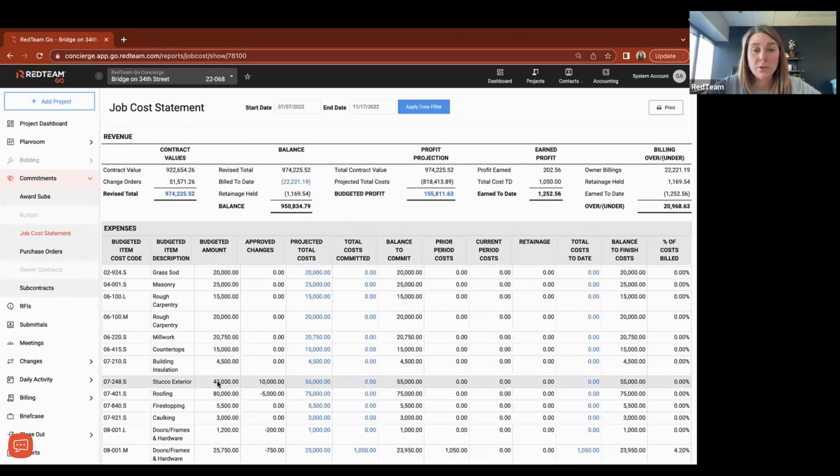So if we're doing some negotiating with subcontractors and we're buying things down, or we realize, hey, I made a mistake and I didn't put enough money in this bucket, or I've got to issue my subcontract for more than I initially thought because I didn't realize this over here. So as we're moving money around and we'll start soon, we're setting up the budget, the construction budget, how we intend to spend the money, which may be different than how we would present the cost to the owner.